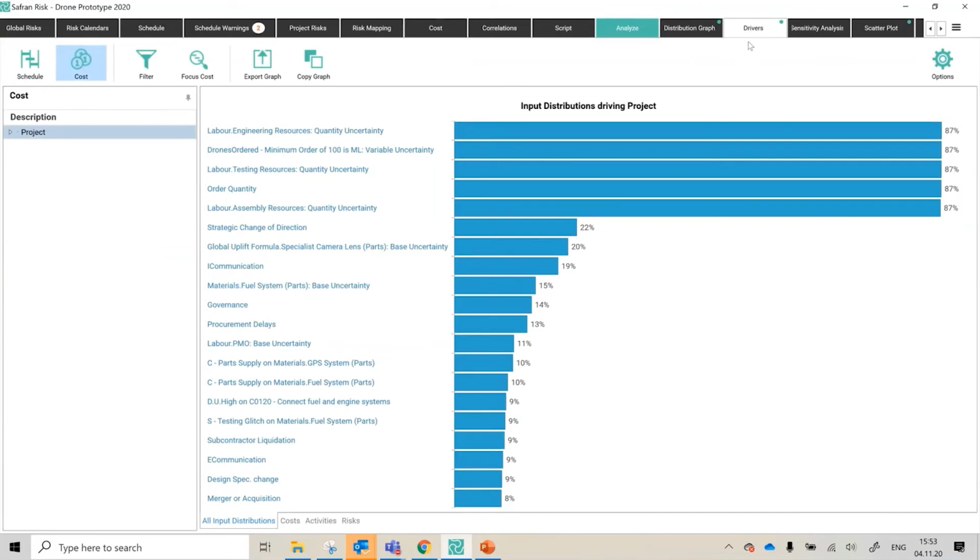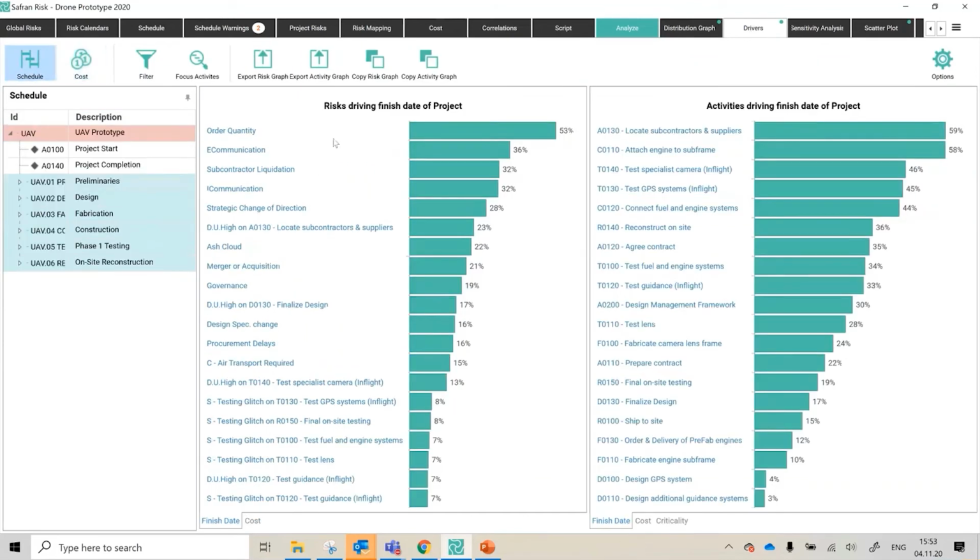Okay, drivers. So the next place you tend to come to after getting a typical histogram S-curve is your drivers. This is using a correlation coefficient to rank order the magnitude of the influence that one thing is having on another thing, which is great for very quickly seeing what is the worst thing that's going on.